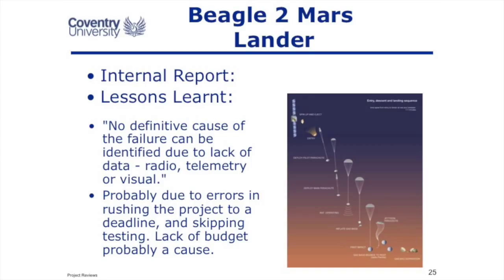Or this example of the Mars lander, Beagle. Of course, they don't really know why it crashed because they don't have the data. But the suggestion in the internal report — the lessons learnt — was that they rushed the project. Aiming for a timescale when you can only launch to Mars at certain times of the year when Mars and Earth are in favourable conditions, and a lack of budget. Think back to the NASA video where they said a lack of budget leads to mistakes.